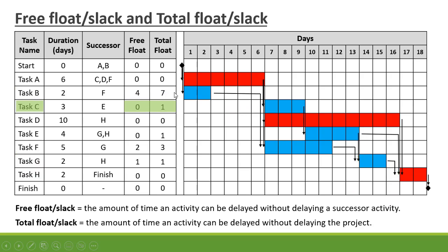Now let's look at Task C. C is connected to E — there is 0 free float. However, for the total float: C is connected to E, E is connected to G, and G is connected to H. There is 1 day of float between G and H, so the total float on Task C is 1 day.